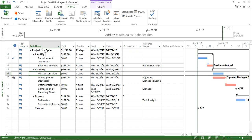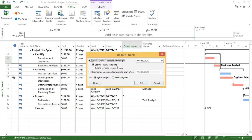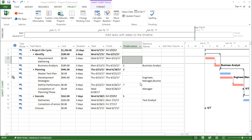Now let me undo this and let me show you how it is done for the entire project. The procedure still remains the same. I have to go under the project tab. I will click on update project and this time I say update project 0 to 100% complete, and I will select entire project and let me hit OK.